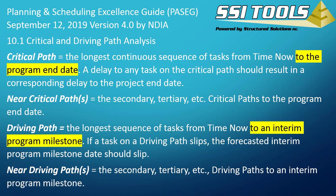SSI Tools supports both critical and driving path definitions. If you want to follow the definition of critical path, just pick the project's ending milestone. Pick any other point in the schedule for a driving path analysis.